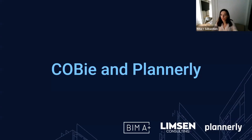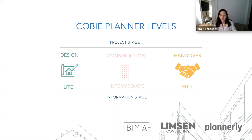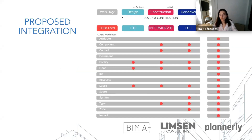Now if we jump into Plannerly - how it was done and developed - I'll give you a quick overview of how it works inside. We decided to be easier and to propose three levels connected to project stages: light, intermediate, and full. We think it's easier to have information delivered in steps or milestones rather than all at the end. Here you can find which COBE worksheets were included at each stage. This is our proposal, and of course it could be customized with the opinion of the client or owner or feedback from the industry. We would start with only three worksheets, then have a few more, and then a few more again in the full stage.